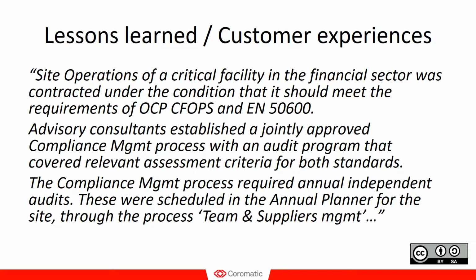So here's also an interesting interaction between the compliance management process and the team and suppliers management. That means that the compliance process establishes the requirement for independent audits on an annual basis, and it establishes what criteria should be audited. But the actual scheduling is part of the regular site scheduling, which takes place in the team and suppliers management.